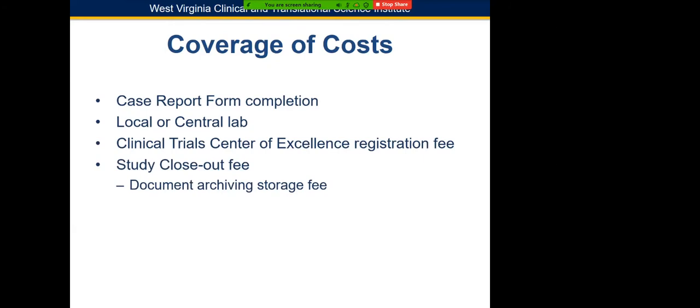Also important is the study closeout fee. You are going to have to meet with the sponsor to make sure that they have all the documentation that they need. We also need to charge a document archiving storage fee to ensure that we can pay for the documents to be stored until we are able to destruct them. Sometimes that's 7 years.